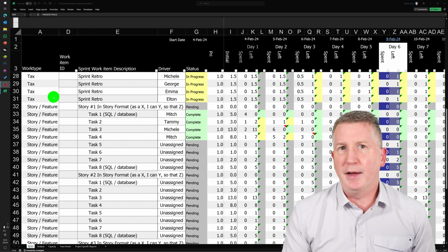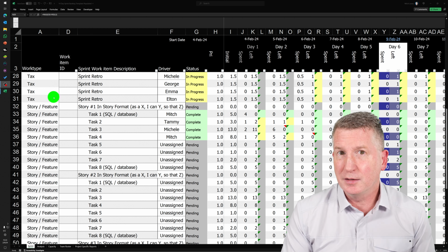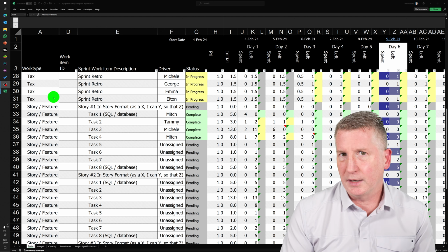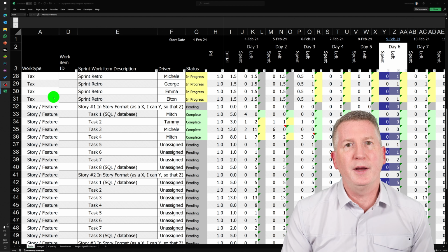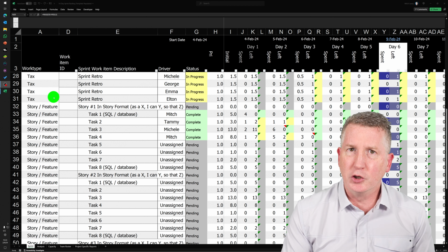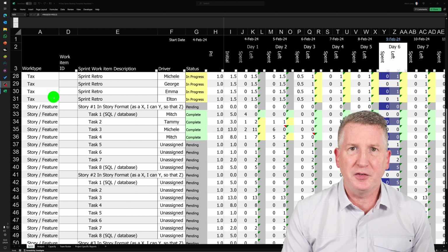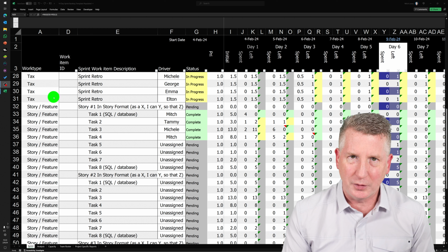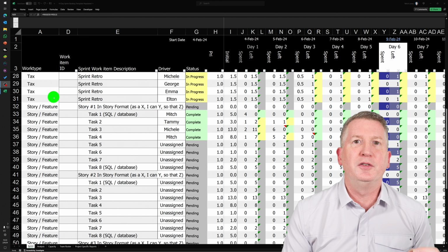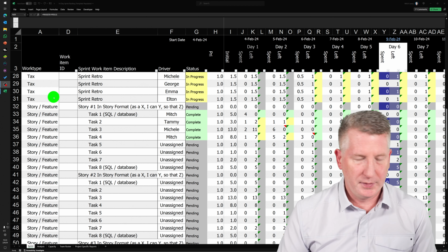And then the other two items that I use, technical debt and spikes. Technical debt, relatively self-explanatory. It's taking a shortcut now to pay it off in the future. And then a spike is an investigation into the unestimable. And it's good to track all this data. And let me show you why.